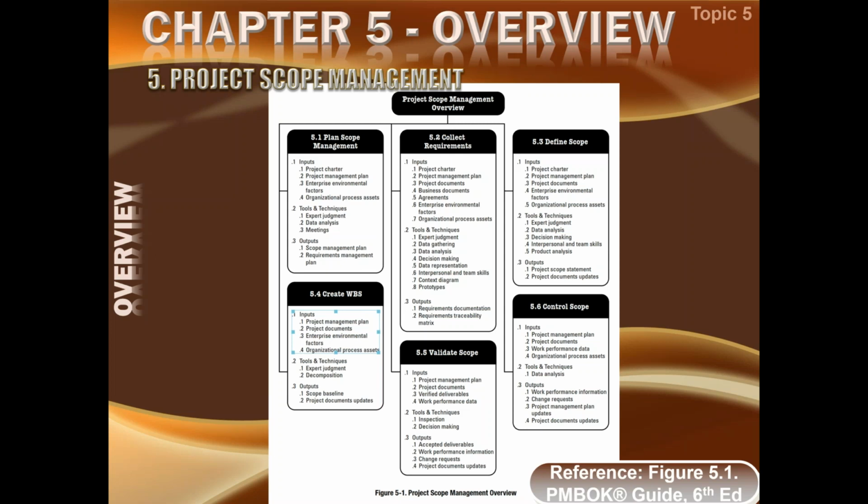So there is a linkage to RASI, but as such RASI is not a subject of scope. RASI is a subject of resource management. You understand my point? जी सर. There might be an indication here of who will do what, but that will be referred to the RASI, and RASI is resource management. The main difference is that this is the scope, this is something which you have to perform, and whom to perform it, that is resource management, and at that time risk comes in.